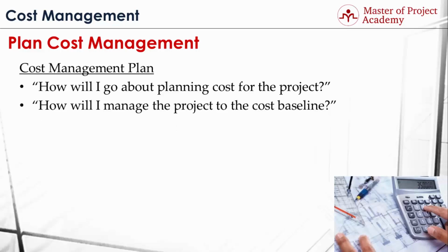And how will I manage the project to the cost baseline? After the budget of the project is determined, cost baseline is taken. Cost baseline shows the initial cost estimate of the project, and if nothing changes in the project or if there won't be any approved change requests, it is expected that the determined project budget will be met. Cost management plan will guide you on when to spend on what throughout the project and ensure you meet the determined project budget. As many management plans, cost management plan is also part of the project management plan, which helps to meet the project goals and objectives as a whole.